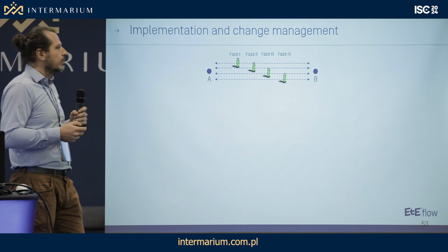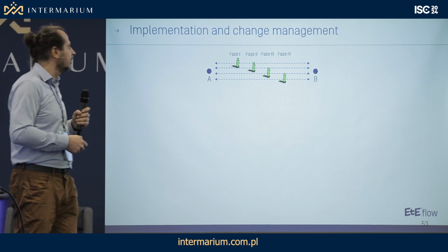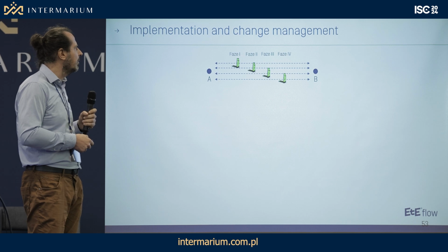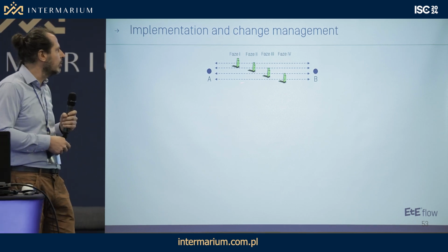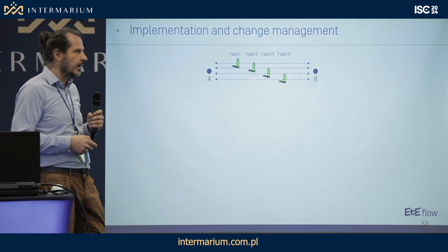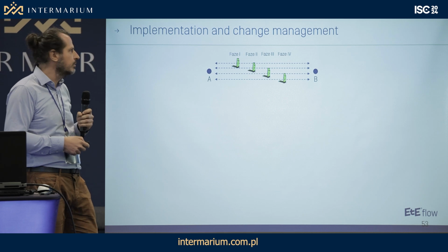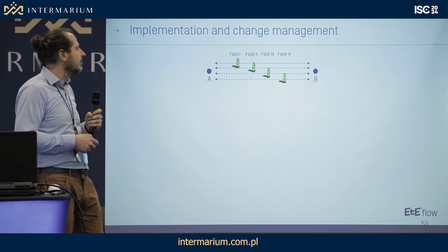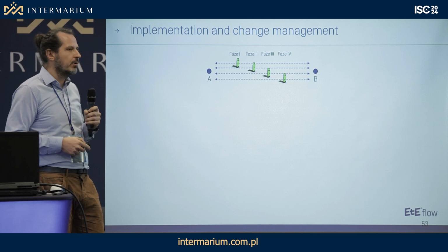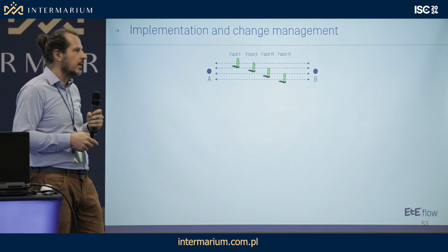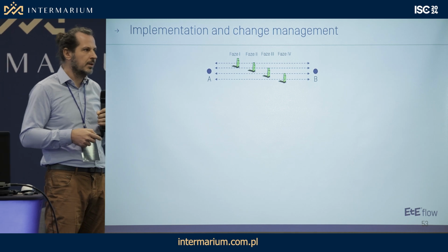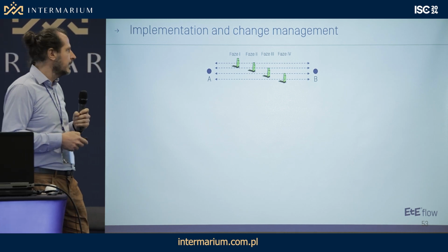Yeah, if we would go with the first approach, 4 robots in a swarm, and we implement 1 robot, maybe 2 robots at the beginning of the project, and after a while we would like to introduce the second, the third and fourth robot, it will need to re-implement the programs of the first 2 robots. Adding new robots to the system will affect the others that were already working there.